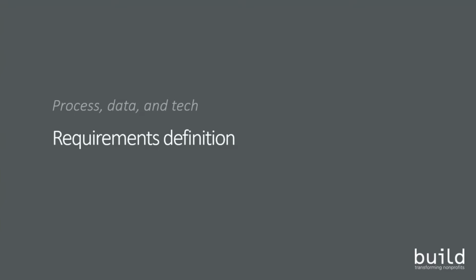And that has a direct impact on the technology that's selected, whether it is appropriate for your organization. And once selected, poor business requirements are one of the leading contributors to projects running over budget and over schedule. One of the reasons that Build Consulting prefers to get involved with client technology projects during the early assessment and roadmap phase is that when we first get involved at the implementation phase, it often becomes apparent that the organization needs to back up and do the requirements definition in a deeper, more thorough manner before it can have a successful implementation. And when a vendor is engaged and the implementation is already moving, it can be really difficult and costly for the organization to push the pause button and back up and do different requirements, especially since that could lead to the decision to go with a different implementation partner or a different software solution.